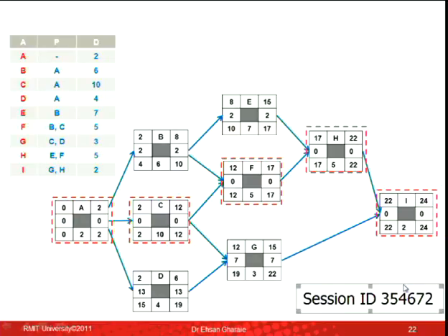In question 1 and question 2 that you've done today, again, the start of one of the activities had 0. So that 0 was part of the critical path. The finish of another activity had 0, so that finish was a part of the critical path. So you find out the total floats and you connect the zeros, that's your critical path. Then it will be super easy.